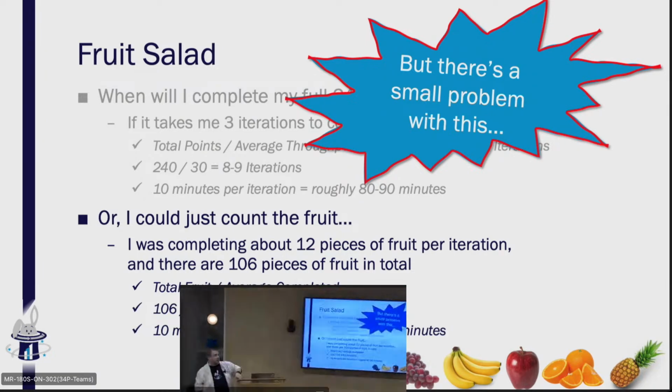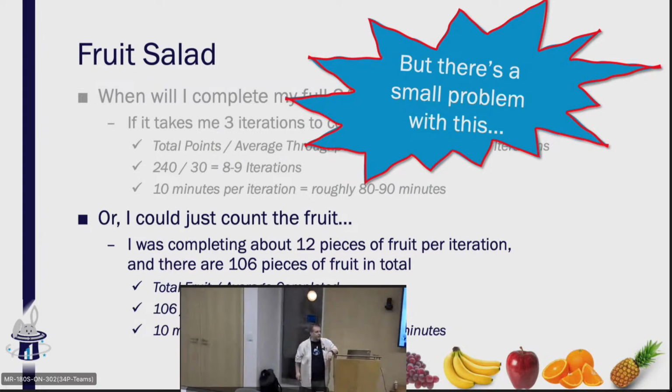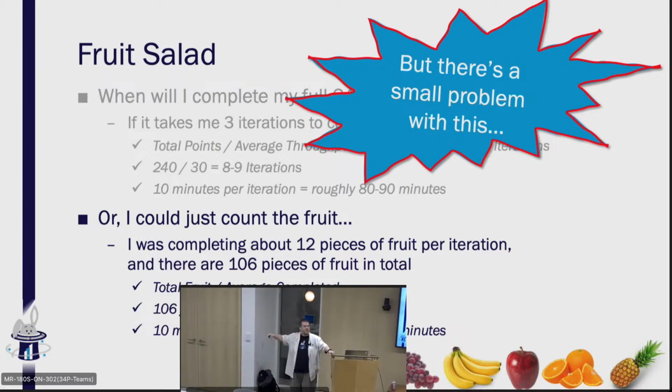Yes, sir. Jeff, so question is, where do dependencies fit in here? Did you have dependencies in the first 3 iterations? Are you going to have dependencies in the next few iterations? The answer is they're the same. That doesn't change because the work of tomorrow looks like the work of yesterday. Now, if we introduce coconuts, for example, and there's a dependency because there's only one person in our entire team who can do coconuts and he's really busy on another project, we've introduced a new type of work. We've introduced a new dependency. We've introduced something that is new. But the dependencies that existed in my first 3 iterations still exist in my 4th, 5th, and 6th iteration.